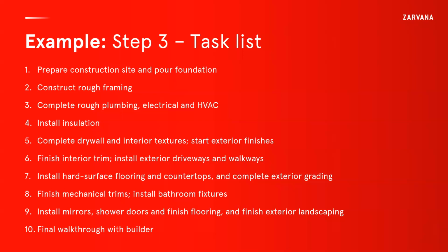When you're thinking about your project, you have to list out what are the steps that are necessary to successfully complete this objective. Here, the key is being comprehensive. Now, that doesn't mean you have to be super detailed. You can see here that we're not talking about, okay, pour concrete in this trough, or nail board A to board B. That's a much lower level of detail. So it doesn't mean that your work plan needs to be super, super detailed, but it does need to be comprehensive, meaning that you can't leave off anything.